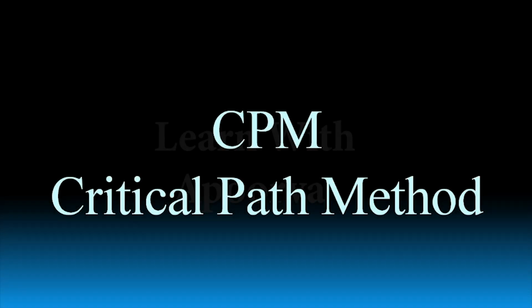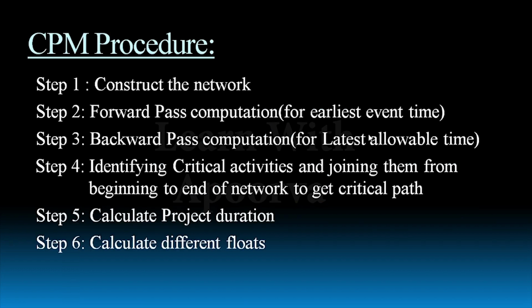Hello everyone, in this video we are going to learn about CPM, critical path method for project evaluation. The procedure is as follows. Step 1, construct the network. Step 2, forward pass computation for earliest event time. Step 3, backward pass computation to get latest allowable time.